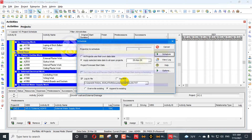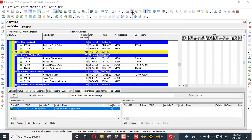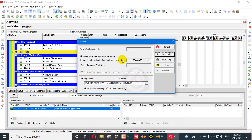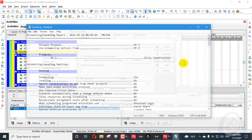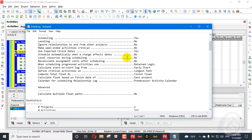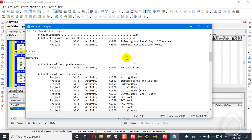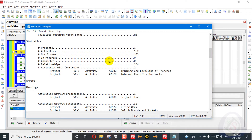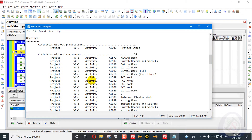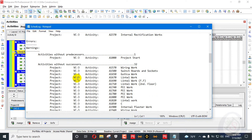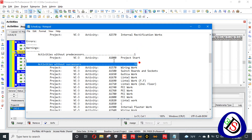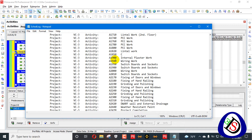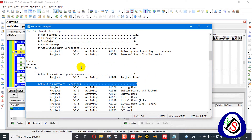Don't forget to see that video. We will go here in the schedule, press 'Log to File,' and schedule the project. Then we will go and view the log. From the log, we can find warnings about activities having no predecessor and no successor. Here we can see 32 activities don't have any successor.